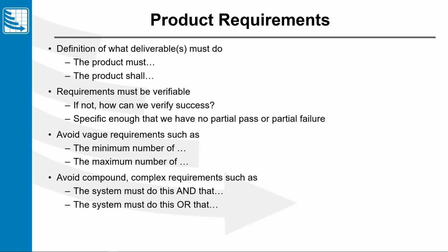And like we already talked about, we want to avoid those compound complex requirements. The system must do this and this, or the system must do this or this. Break them apart into separate requirements. We don't want to have those partial passes or partial failures.